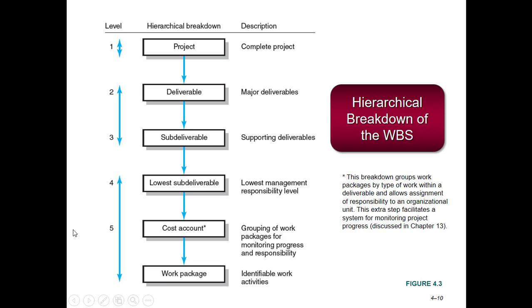So this shows the elements of the hierarchy. You start at the top level with the project. Then you have your major deliverables, sub-deliverables, lowest sub-deliverable, the cost account level, and then the work package.